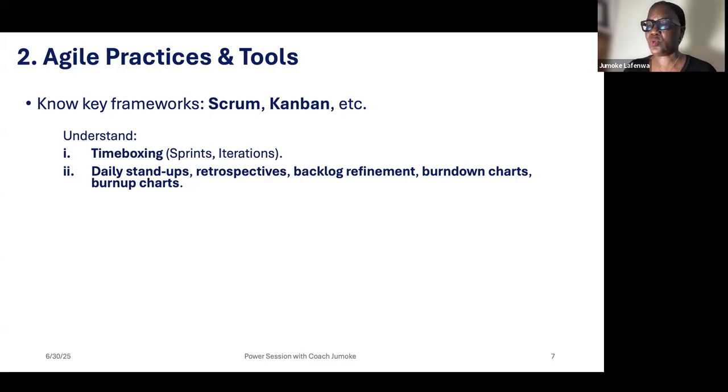Now, predictive is also using it. You sit with your team to determine what worked well, or what went well, and what didn't go well. So you want to know what went well so that you can replicate it in the subsequent iterations. And what didn't work well, and you can even ask why didn't it work well, so that you have understanding, so that you don't repeat it in subsequent iterations, or you work on it to improve it so that you can repeat it in subsequent iterations.